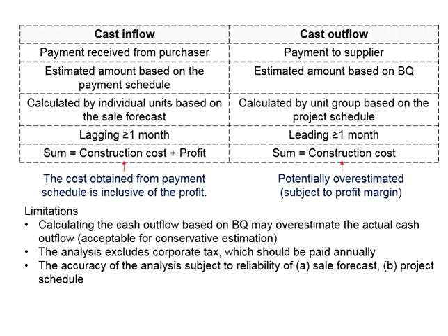Next, in our computations of the cash outflow, the corporate tax is not being included. You know that corporate tax shall be paid annually. If you wish to have a more accurate estimation, particularly when you want to compute your net cash flow, for you to determine the capital investment that you need to have, as well as the final profit that you have acquired after tax, for you to compute the return on investment, probably you can consider the corporate tax.